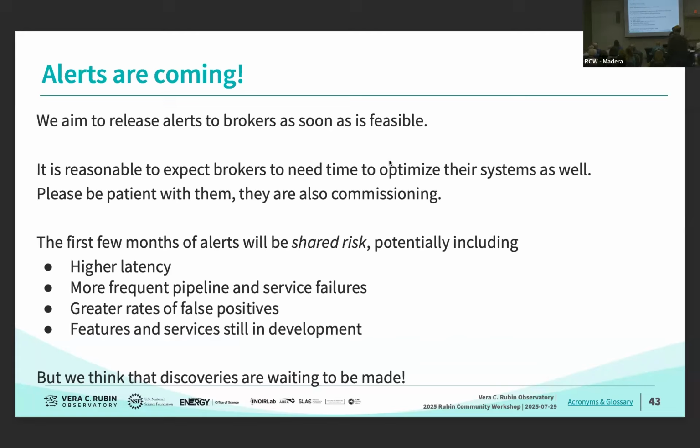And the team recognized, it's been kind of a concern for some time, that the technical solution we had baselined wasn't really going to scale to the expected user demand and the scale of the data. And so what we're exploring right now is using Google BigQuery to host the PPDB. So we're working actively on doing that export from APDB to PPDB, understanding it's a commercial service, understanding the cost profile, understanding what it looks like under query. And so that is active work that's ongoing, but it's not done today.